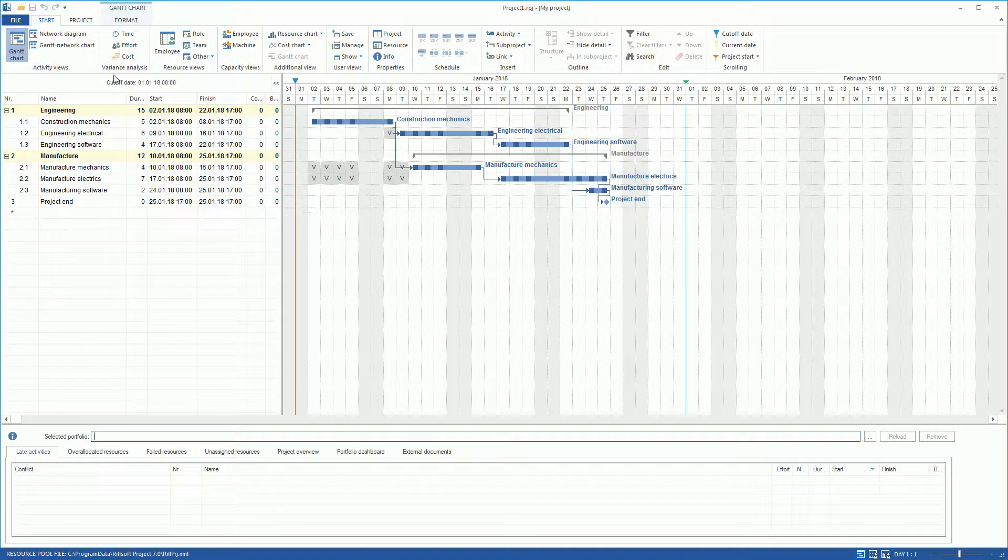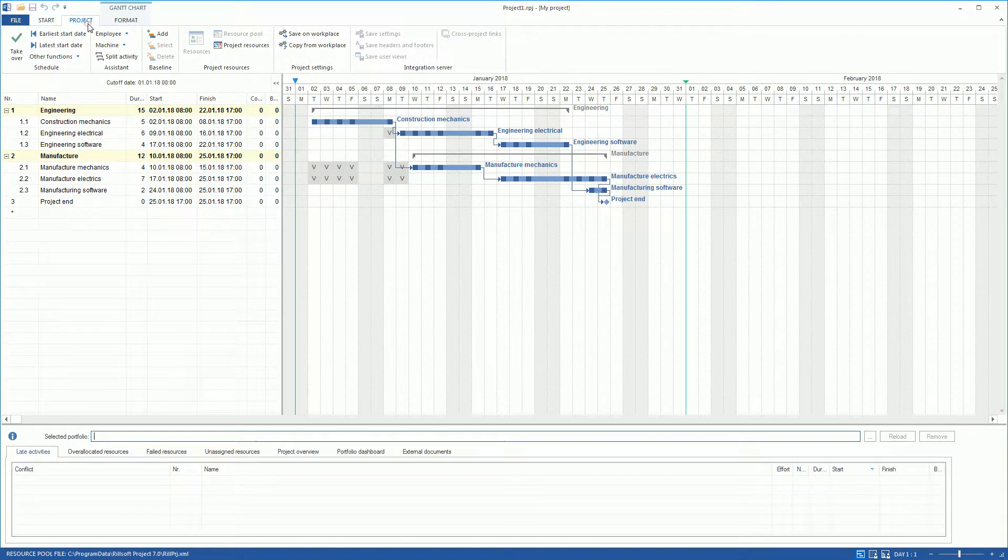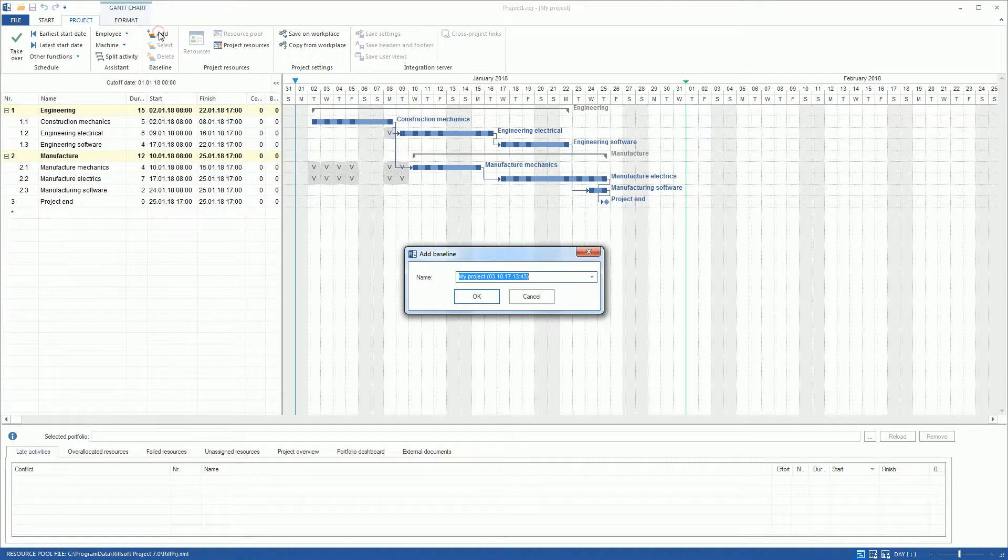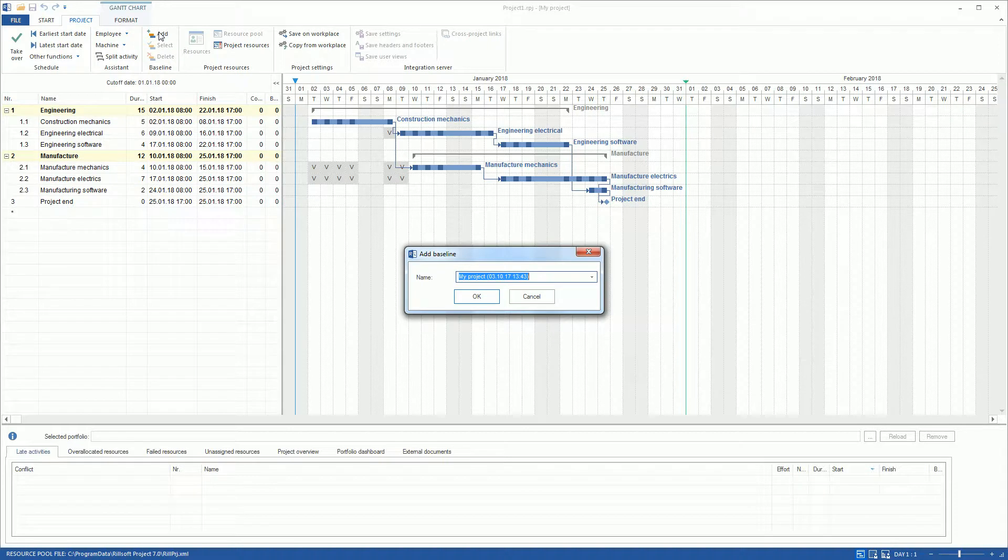First, on the Project tab, we click on the menu item Add Baseline Plan and save a Baseline 1.